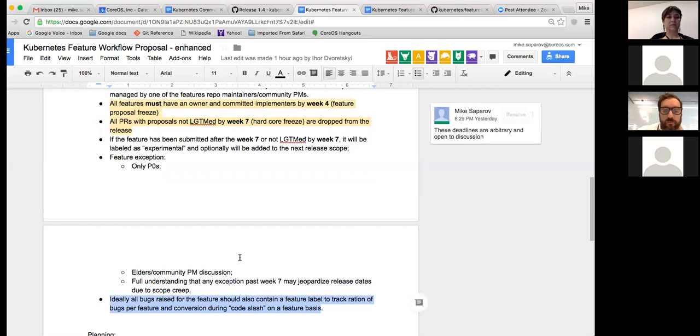I just think you avoid games of release chicken by providing clarity and clear exit criteria as you move from one phase to the next. That's all. So we absolutely do have that. It's not represented here. Please go to the Kubernetes feature repo and click on Issue Template. In that, you have a series of gates related to alpha, beta, stable, and each one has a set of check marks next to it that are required. So it's not date driven, but it is stability or completeness driven.